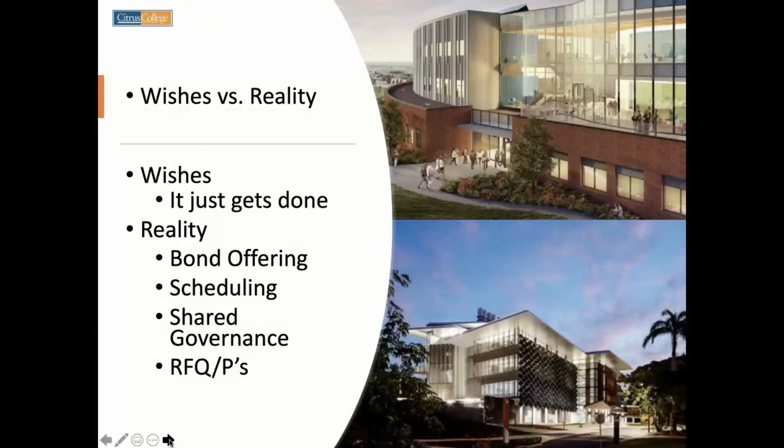So in our case, with 298 million, we're probably looking at least 3 different sales of the bonds. So the first one, probably between 75 and 100 million dollars would be gained. That would go into the coffer, and then your building plan, scheduling and everything else would come off of that. Once that one is getting close to consumption, you would go back to San Francisco or New York with your bond counsel, have another offering, and then the same process would occur for however many times you're going to sell your bonds.